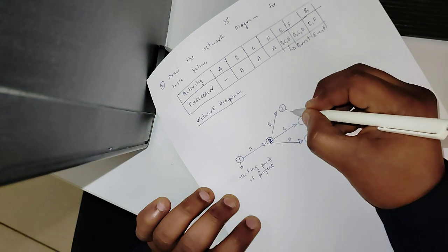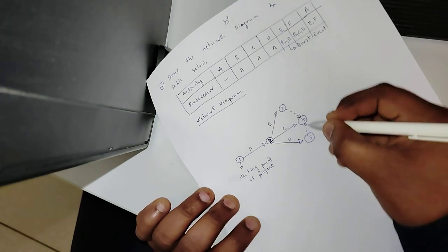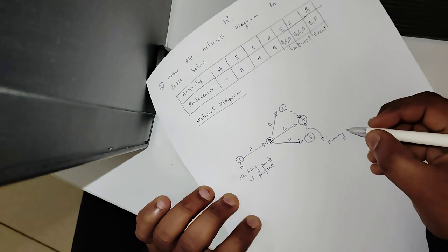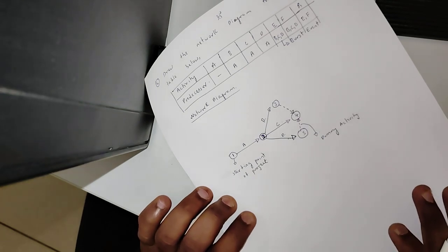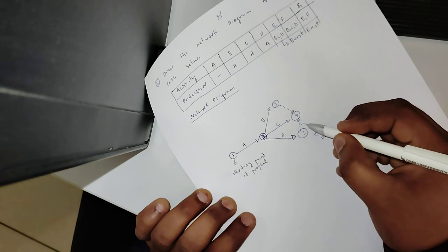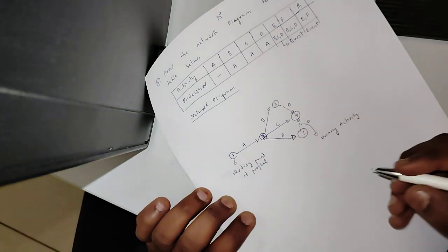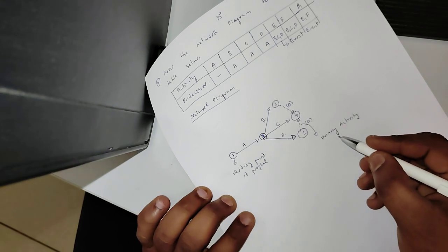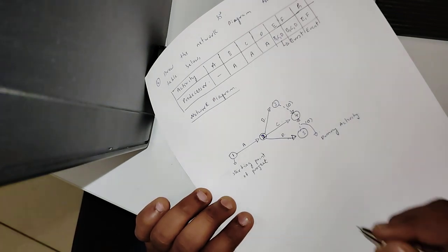So now I am joining the events 3 to 4 and 4 to 5, and this is called a dummy activity. A dummy activity is an activity in the network with zero time. We will not mention the time required to complete it, or assign any resources for it. A dummy activity is a hypothetical activity that takes zero time or resources, used for completing the network diagram.